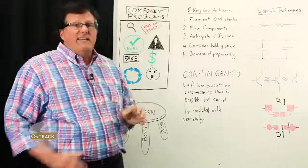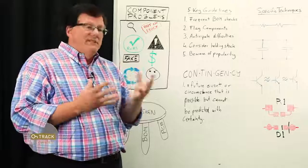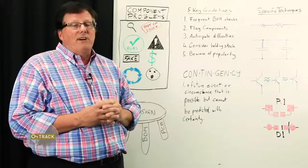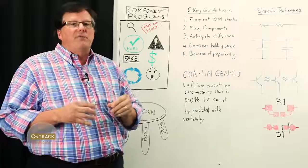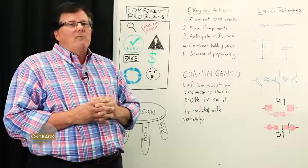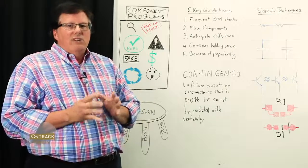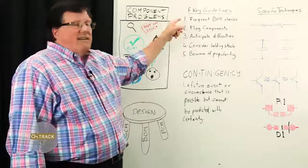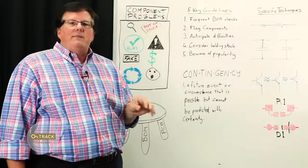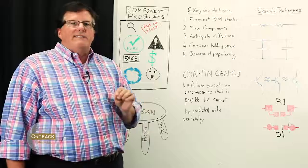So let's talk about some guidelines that you can use to mitigate some of these issues. Frequent BOM checks. Like I said, BOMs typically, you decide on your components early in the process, you work through that, you get your prototypes, and a lot of times it's not really looked at till closer to the end of the process. Recommend that you check that BOM early and often throughout the design process.